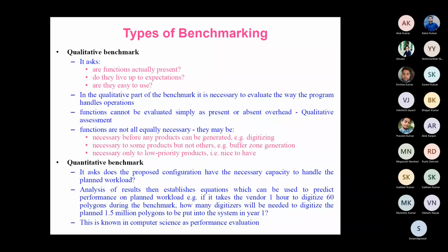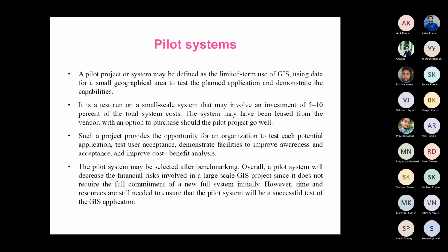Then there can be quantitative benchmarking. It asks, does the proposed configuration have the necessary capacity to handle the planned workload? Analysis of all results then establishes equations which can be used to predict performance on the planned workload. Example, if it takes the vendor 1 hour to digitize 60 polygons during the benchmark, how many digitizers will be needed to digitize the planned 1.5 million polygons to be put in the system in 1 year? So this is known in computer science as performance evaluation. So such type of benchmarking could be done before purchasing any of the product.